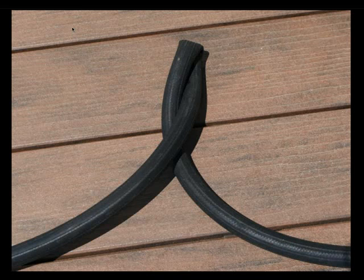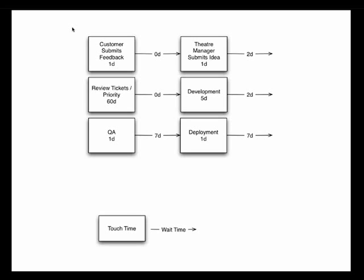There's a theory of constraints which says: first, we want to identify those bottlenecks — we can use the value stream map to do that. Then we want to identify, protect, and see if we can route things around the bottleneck. In the case of QA, maybe we start doing developer testing so our initial quality is much higher. And then, lastly, we want to exploit the constraint — improve the efficiency of that particular constraint. Maybe there's a tool or a different method we can apply to quality assurance.